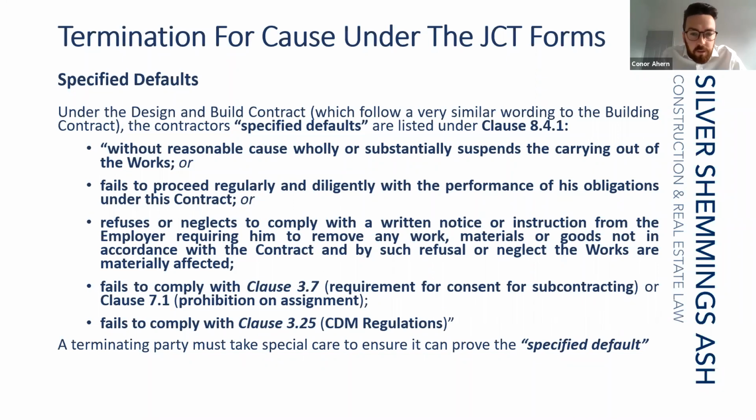The next ground is the refusal or neglect to comply with a written notice or instruction from the employer, which requires them to remove any work, materials or goods not in accordance with the contract, and by such refusal or neglect the works are materially affected.